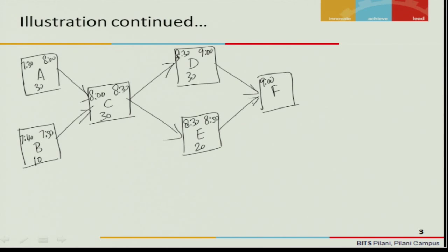Now let us do it in the reverse way. If you have to start the meeting at 9 o'clock, when is the latest time by which your client should complete his conference call? The latest, he has to complete it by 9, right? And when should you complete your morning course work? At 9. The maximum that you can take is only up to 9 o'clock.